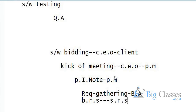First, at the software bidding stage, the CEO goes to the client site and finalizes the project. Then at the kickoff meeting stage, the CEO comes back to the organization and arranges a meeting with all project managers to select the project manager. Once the project manager is selected, the project manager prepares the first document called the Project Initiation Note.